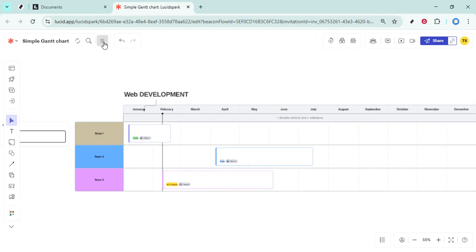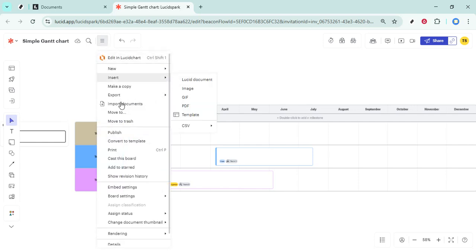That's it. Go to lucidchart.com, open More Templates, search for Gantt chart, select the flow diagram and click Use, then customize it to match your project.